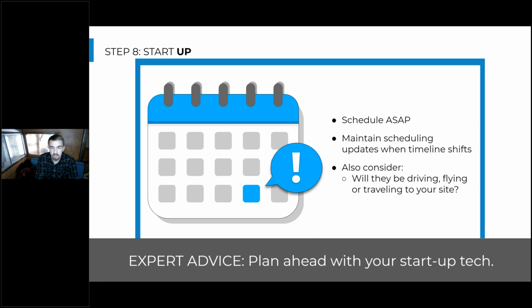So in the technician, there's going to be a kind of a variable rate sometimes, depending on where the factory technician is coming from, whether they have to fly and those costs have to be covered by the actual startup costs, or if they're right down the road at the rep agency. So that's a good thing to keep in mind, even when you're bidding a job, what it would cost for the startup operation of these heat pumps.